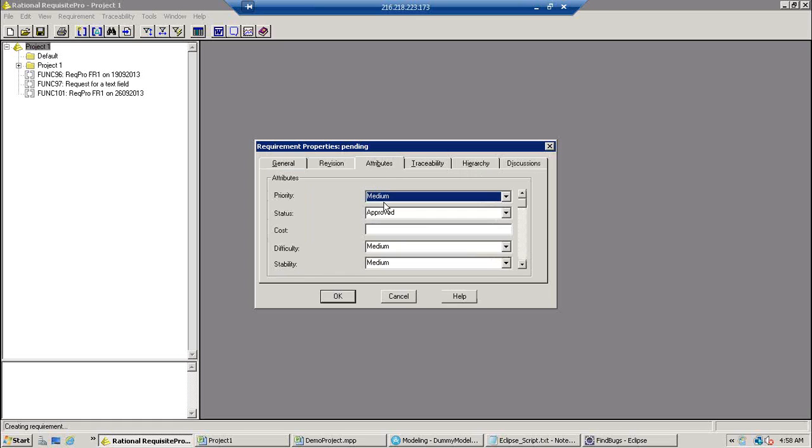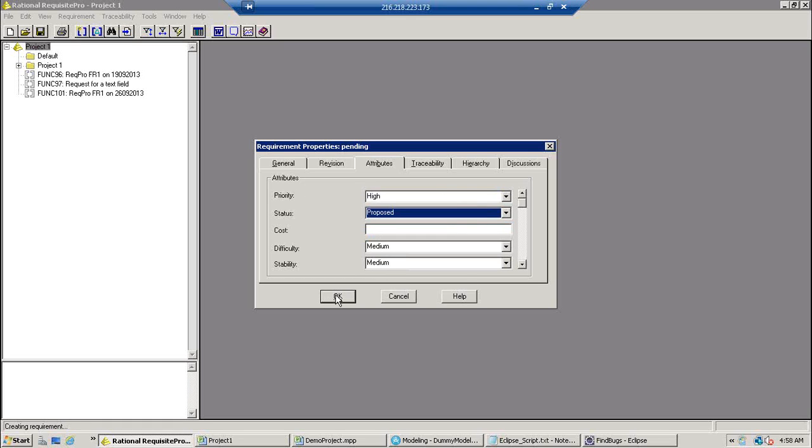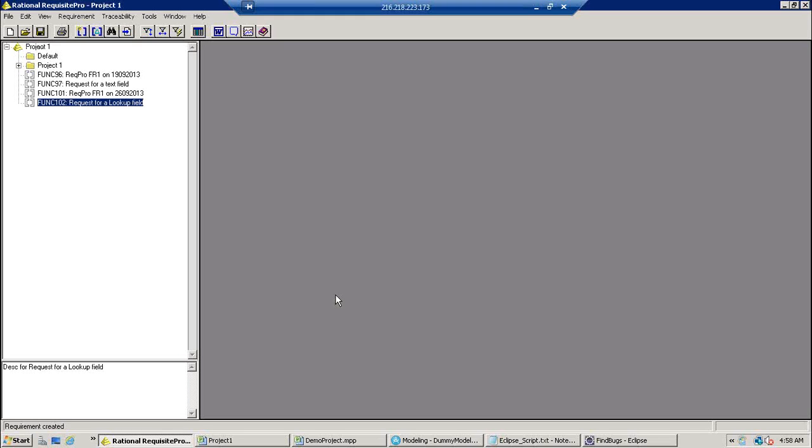Apart from the title and the description, I can go ahead and put some attributes as well. Let's say the priority of this requirement is high and the status is proposed. With that, let me save this requirement. Now, as this requirement is saved by the business analyst, it flows into the central repository of Covea Omnibus, and from there tasks are generated for the planning phase for the project manager to estimate the different tasks that are automatically created for this particular requirement.